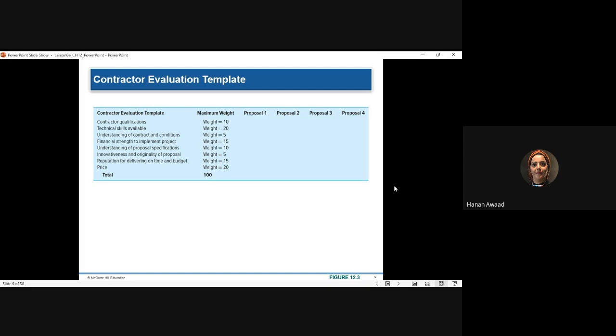Or they can come and facilitate the discussion. So one of the tools that I use, I will give each one of the team members, for example, red dots, these tiny stickers. And I will ask them, based on their information, their expertise, after reading the proposal, to use their red dots.